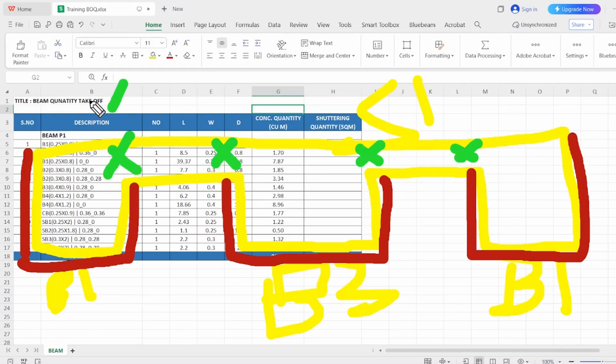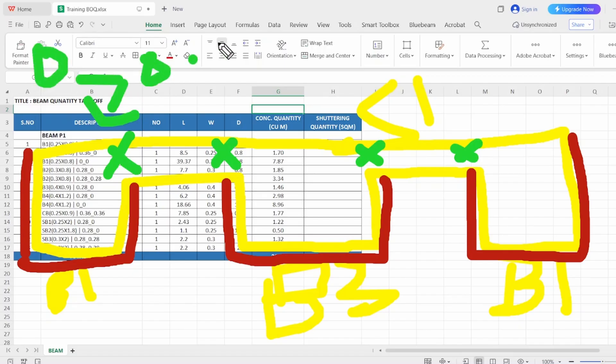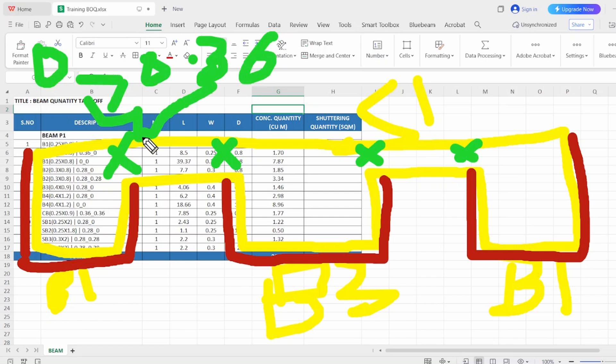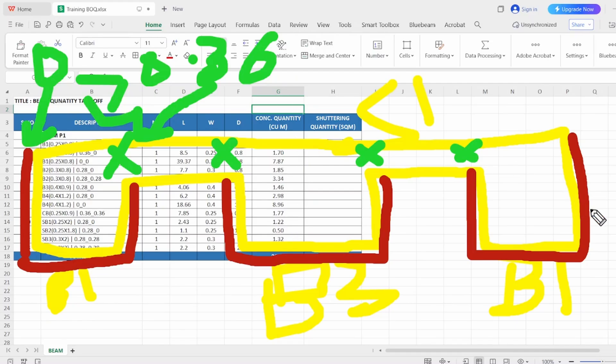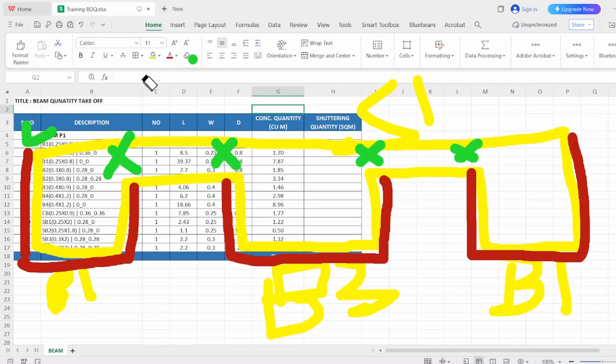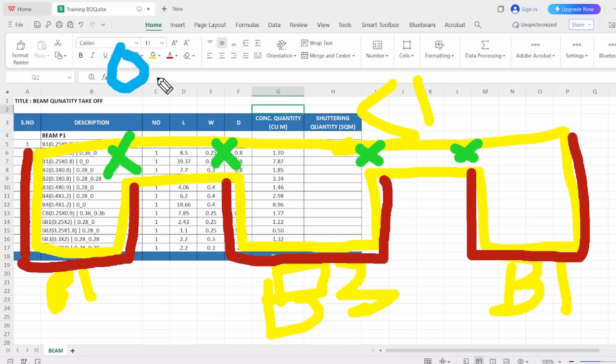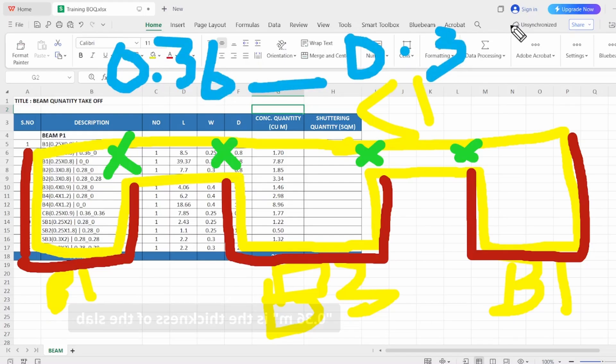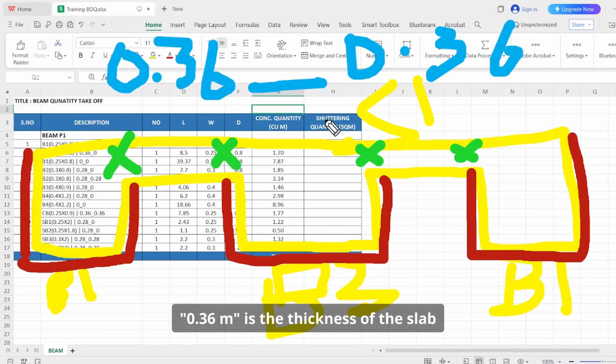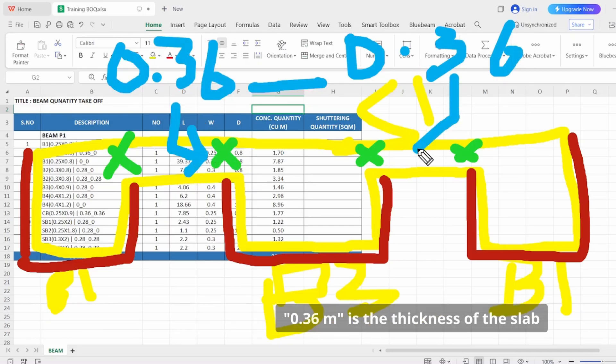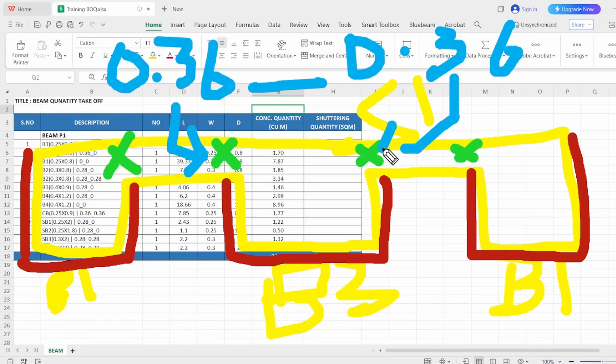So in this case we have to deduct this part. For this beam, if we write 0 underscore 0.36, which defines that this is the thickness—this is 0.36—we have to deduct here. We don't need to deduct anything, so for this beam, imagine we have written 0.36 underscore 0.36, which shows that this is the area we have to deduct it for the beam.